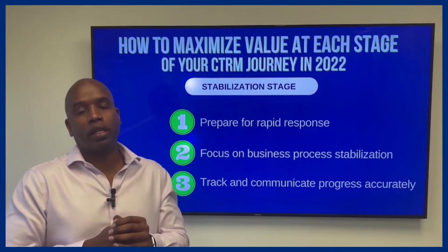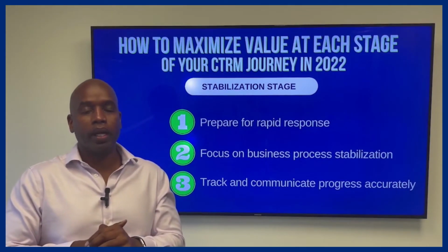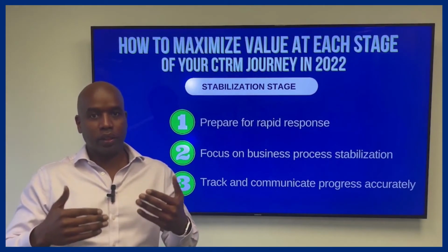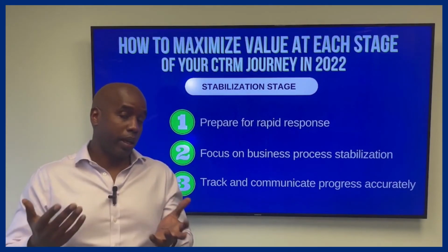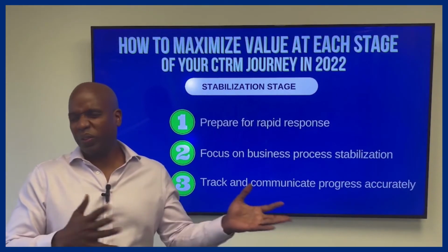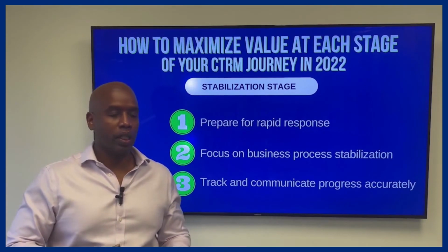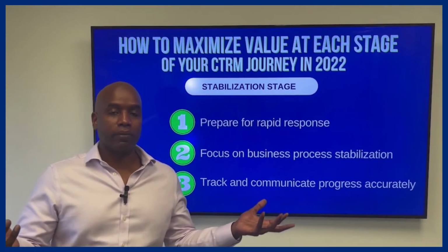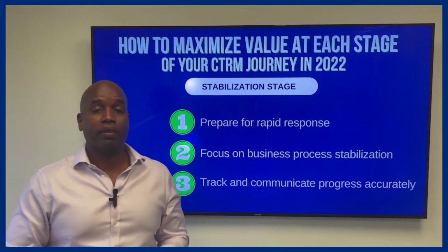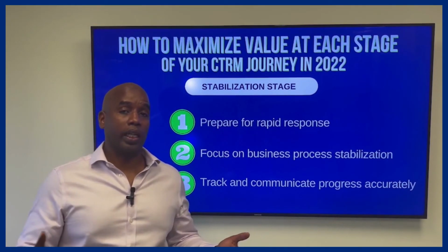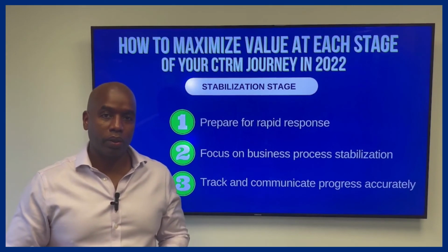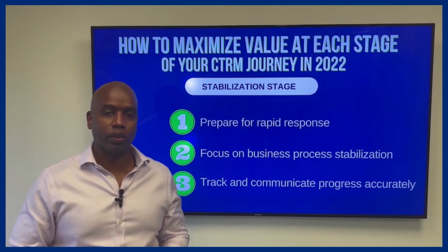These are just some tips that we use to help people see with their own eyes that this is going as expected. We use KPIs for that, and then we also layer in priorities. Hopefully we don't have any SEV 1 or SEV 2 issues, but if we had 30 SEV 3, we can see that by the end of the week we've got 5 left, and by the end of the next week maybe we've only got 1. That type of reporting and prioritization really helps to give everybody a sense that things are going well.